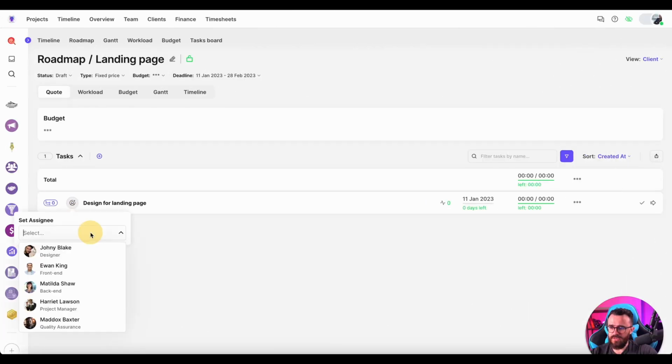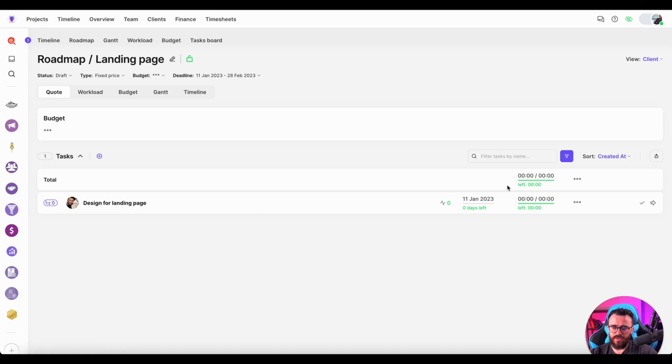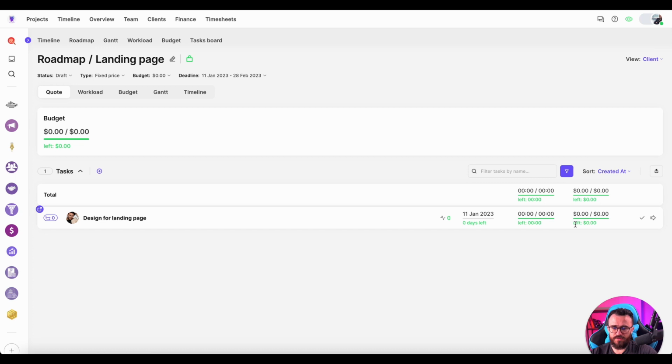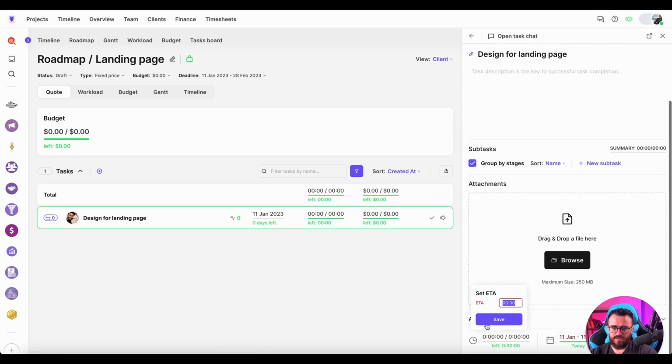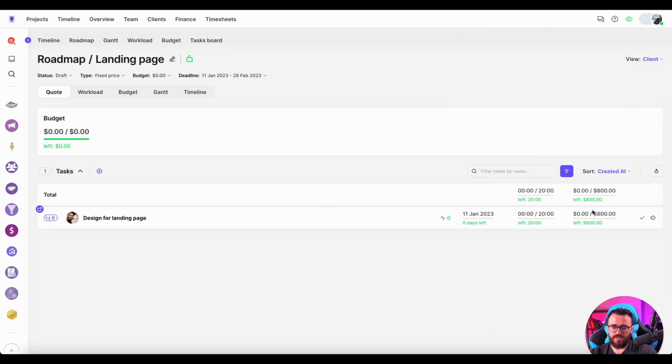I know that Johnny Blake is the designer. Oh, actually, I have a role here. So now I assigned Johnny, and there is no cost. Let me show it first. There is no cost because I didn't estimate the task. The estimation might be done by your team, but in this case, let's say I know it's a standard 20 hours. So I'll just put it here.